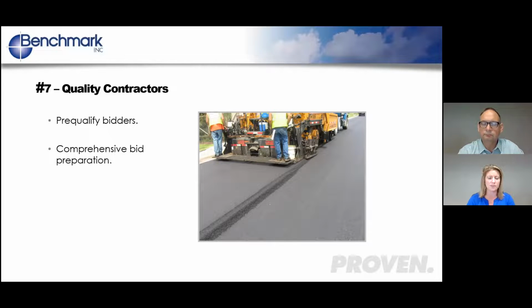It also helps us understand what equipment they might have and how many crews they might have, because there is such a varying level of complexity to different types of paving projects. You can have a pretty simple overlay project, and then you may have a more in-depth, full-depth reconstruction project. So you want to make sure that the contractors bidding on your project are qualified to do the scope of work that's actually being bid.